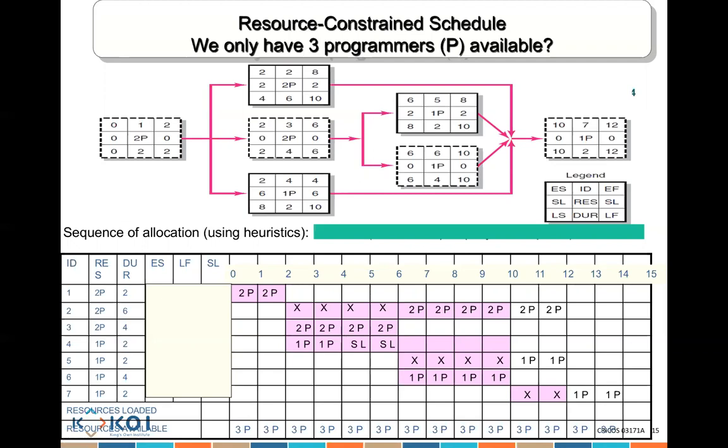Sorry, sir, but what does that mean? Because table 4 says the slack is 6, so I don't see it matching up with the Gantt chart. Don't worry about the Gantt chart. The Gantt chart is based on having as many resources as possible. Now you're saying, I do not have as many resources as I need. I have limited resources. Because you have limited resources, the timelines you see on the Gantt chart will change. So if, for example, there were no resource constraint, no problem. You can start at any time. You can start it even in day 8.